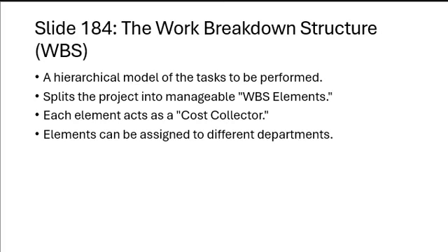The work breakdown structure, WBS. So WBS is a hierarchical model of project tasks to be performed. It splits the project into manageable WBS elements for control. Each element acts as a cost collector for expenses. An element can be assigned to different responsible departments. WBS provides clear visibility of project scope and cost and helps the manager track the progress across multiple project